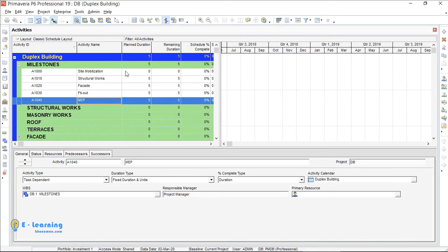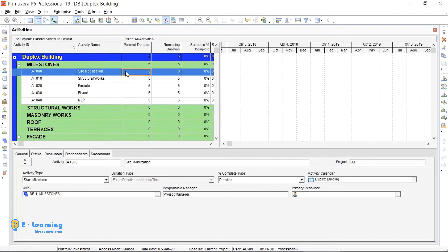Creating activities under milestone WBS is finished. You see, by pressing Insert from keyboard, there is no place to choose the type of the activity. I select my activity. On the general tab from activity type, I select a type of the activity.